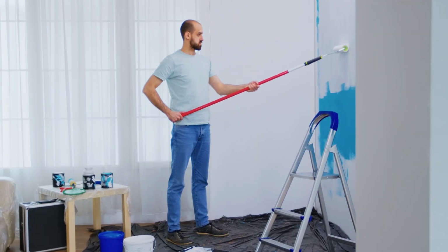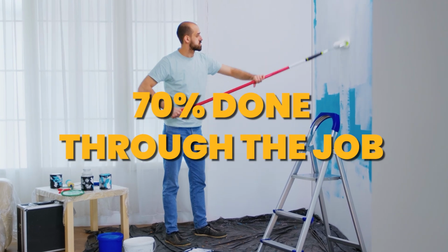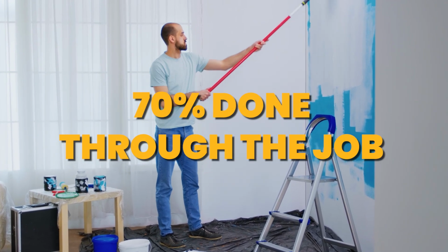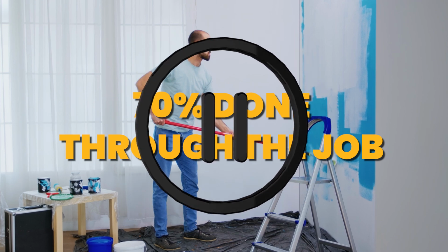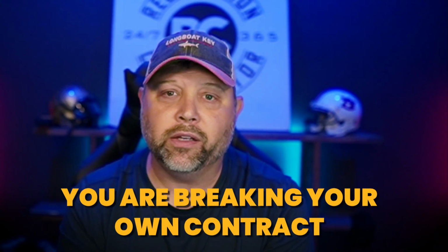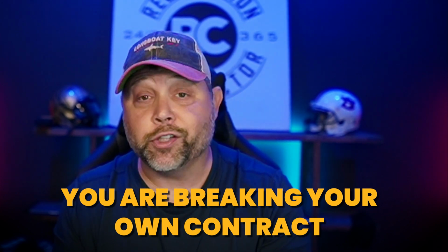You're halfway done through the job, or 70% done, and they haven't paid you yet, okay? And you're getting a little angry, and you're going to stop work. You can't stop. Did you know that once you start a project, you can't stop it? I would virtually guarantee everybody watching this video, if you stop work, you are breaking your own contract, because your contract is that you are going to do the work. Your contract is not that you're going to start it and stop it. It's that you're going to do all of it.